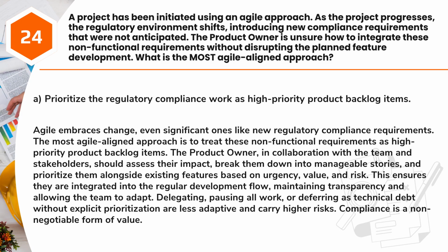The product owner, in collaboration with the team and stakeholders, should assess their impact, break them down into manageable stories, and prioritize them alongside existing features based on urgency, value, and risk. This ensures they are integrated into the regular development flow, maintaining transparency and allowing the team to adapt.